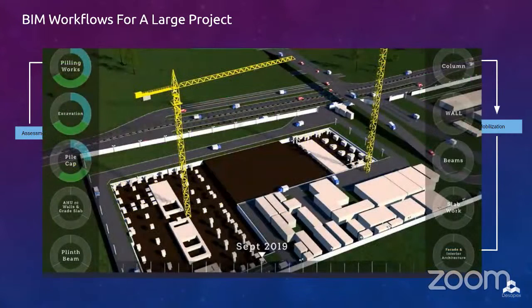Prior to proceeding with the construction and finalizing the construction cost and time schedule, the owners can make use of the latest tools and technologies that allow them the 4D, which is time, and 5D, cost, simulations. This helps the contractors, owners, and the design consultants to visualize the project progress in terms of the building construction. The contractors can use the same digital three-dimensional Gantt charts for their construction activities. The owners can now allocate and reserve funds and cost required for the specific time frame, and all this can be documented for the internal management approvals.